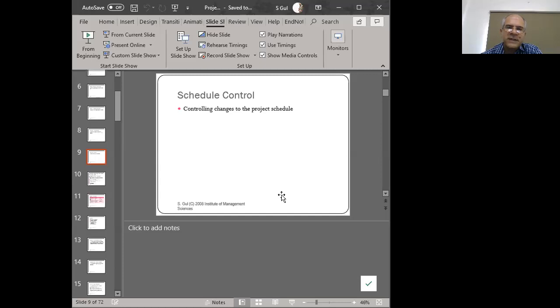But we may have instances where our reality is lagging behind the plan. For example, we thought that in 3 days we would do XYZ tasks. And when we actually go through the reality, we find that by the end of 3 days, we've only done one or two of the tasks, meaning one or two are left. So in that way, the reality has fallen behind the plan. So if we find that, we normally say that there is now a misconfiguration or a configuration mismatch between the plan and the reality. So in such cases, then we have to exercise control.